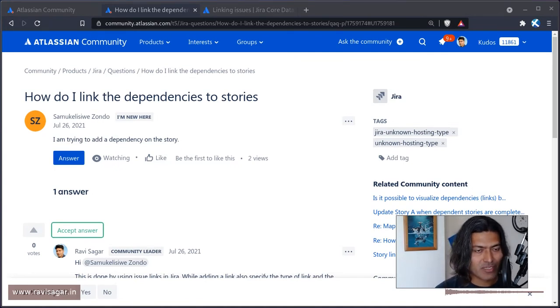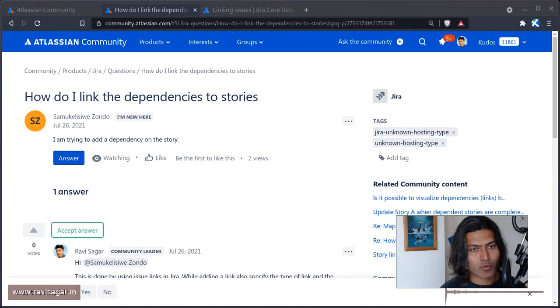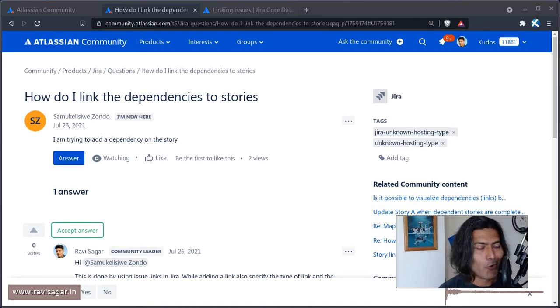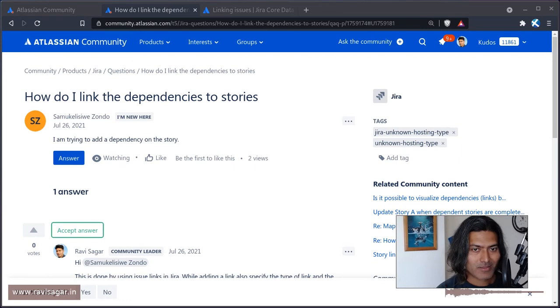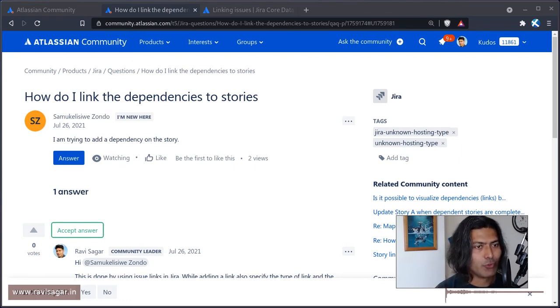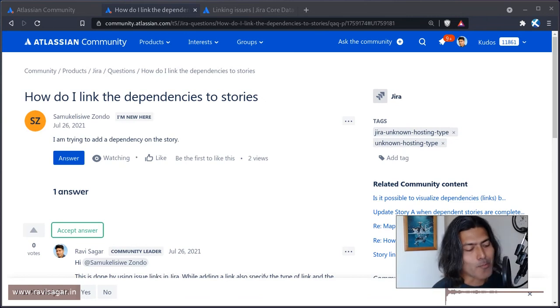Because if you're waiting for something from another team, that particular task will be probably scheduled before on the timeline. But the short answer is that you have to use issue links in case you are trying to manage dependencies.